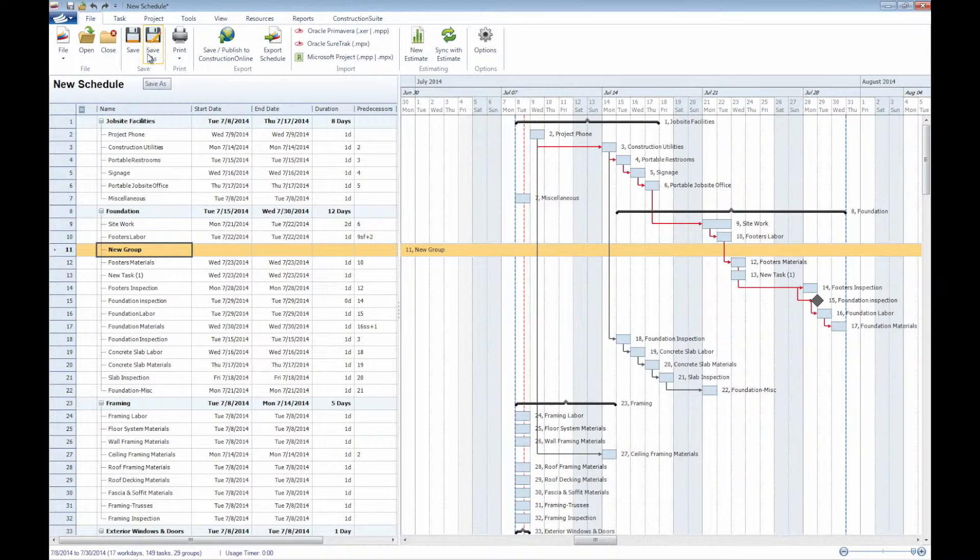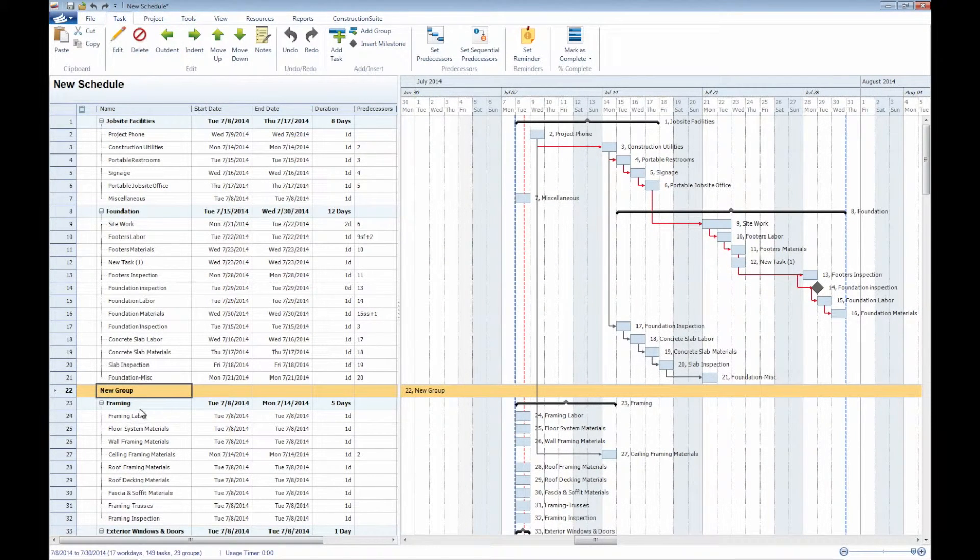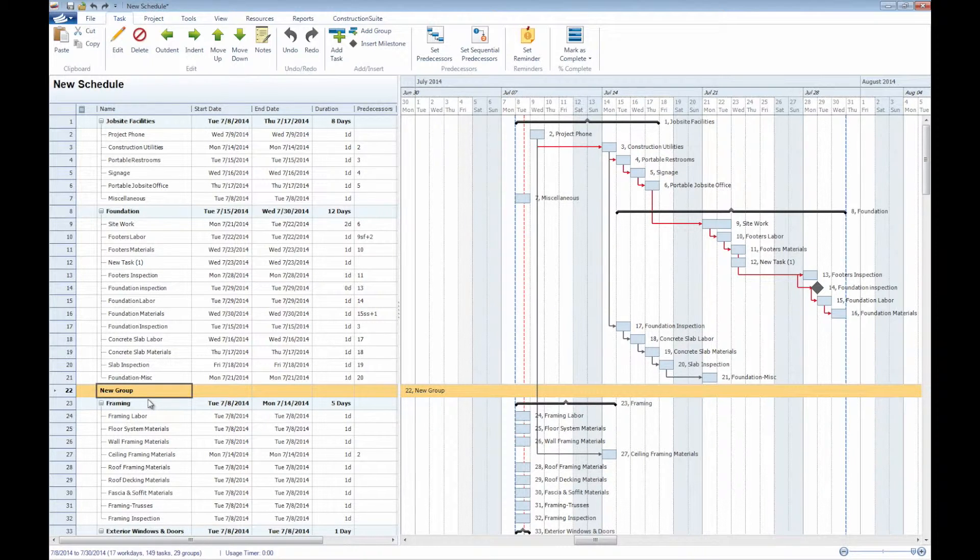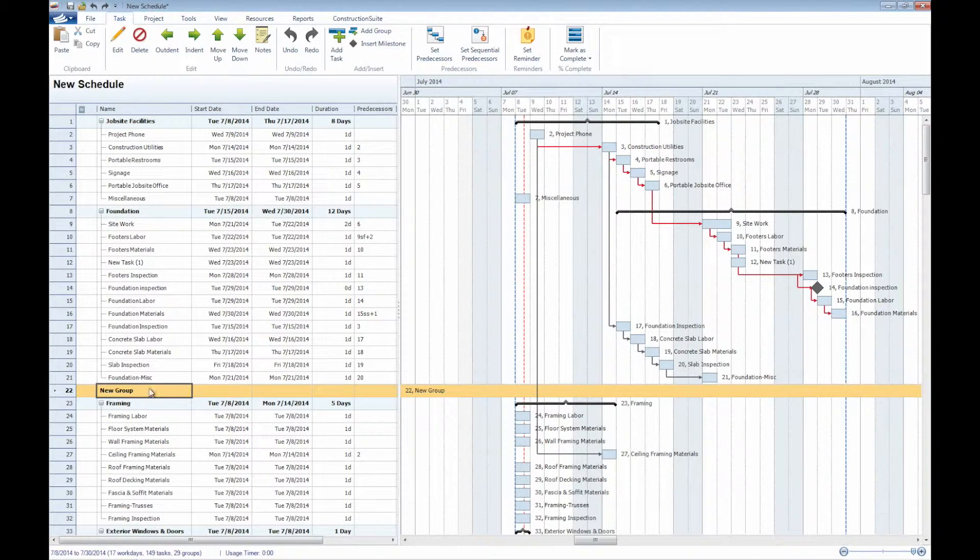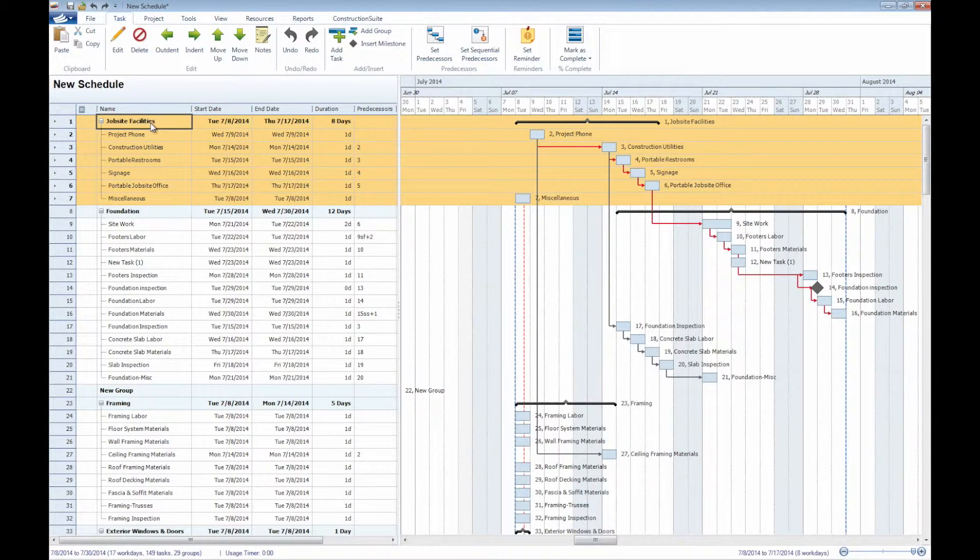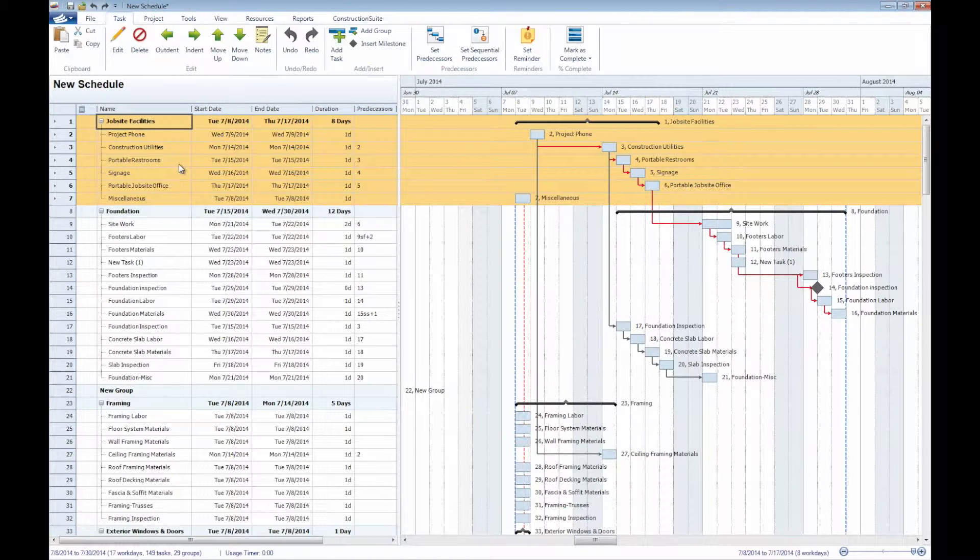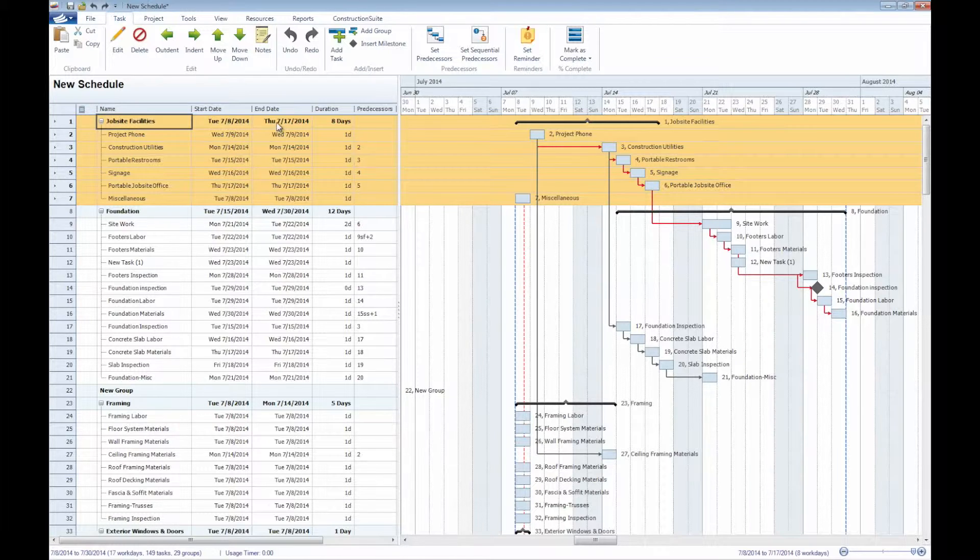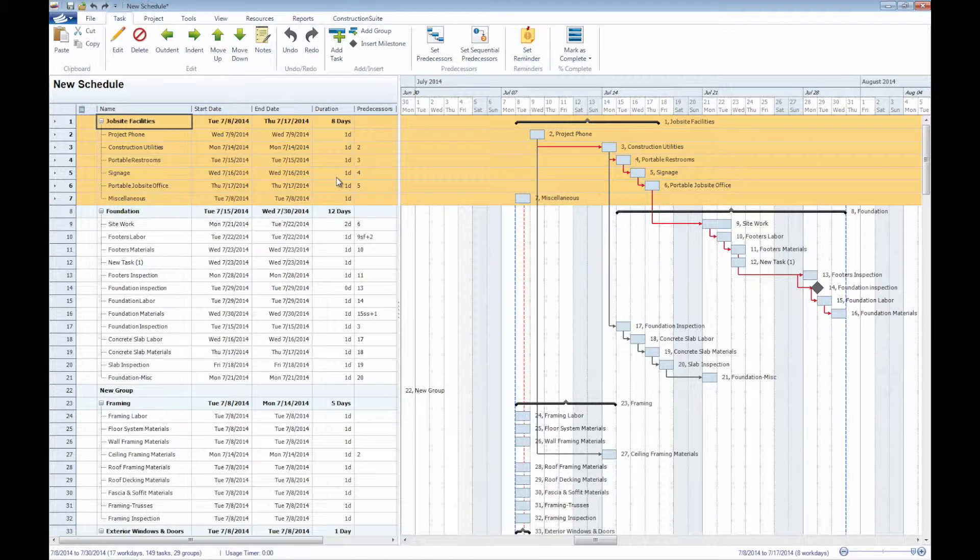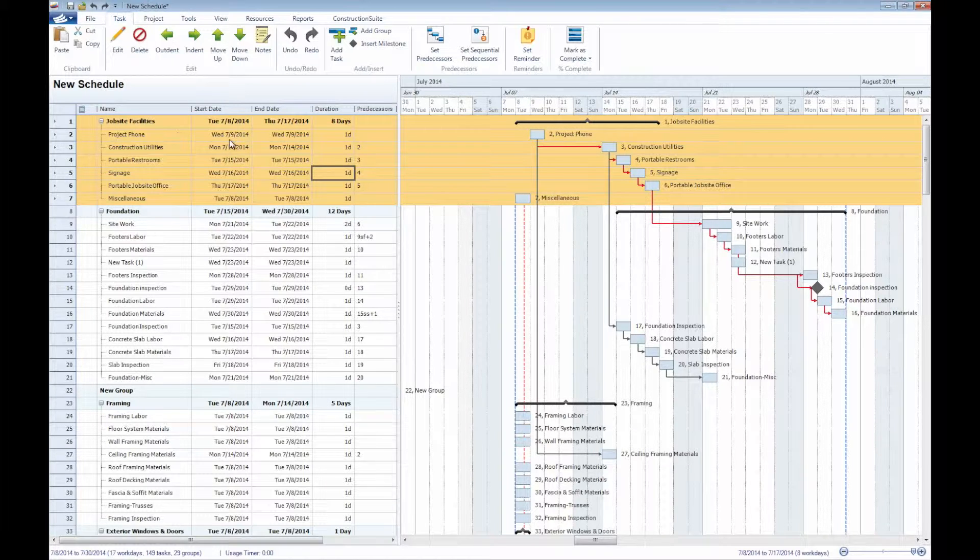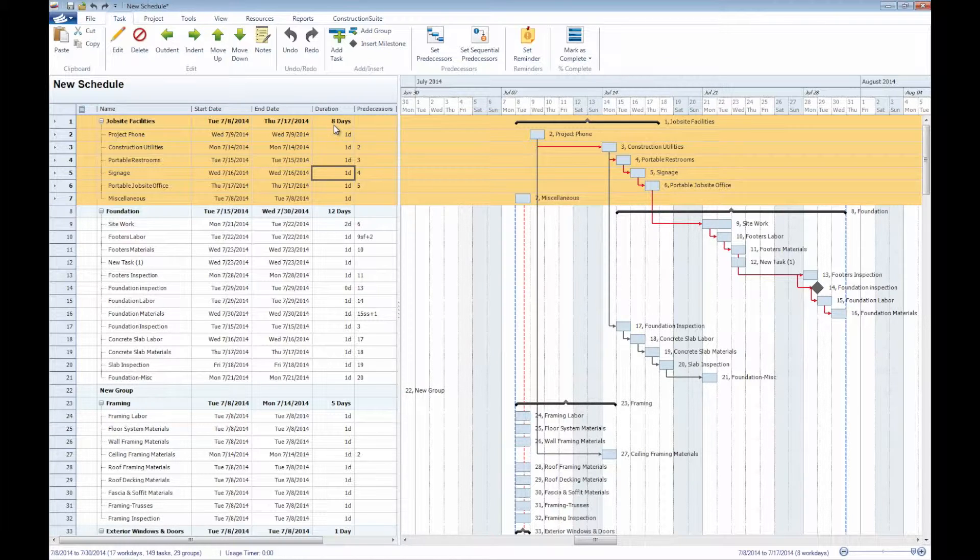Just like within our estimates here, our groups are going to include any of the tasks beneath them, much like the categories, whereas the tasks within the schedule are very similar to the subcategories within our estimates as well. We'll see here that we do have a group, job site facilities, and the corresponding tasks, or subgroups, if you will, beneath these as well. All the information that is included within the group here, specifically with the start date, end date, and duration, are pulling directly from the corresponding information of the tasks beneath it. We'll see here that within the job site facilities specifically, for the eight tasks that we have for one day apiece, all total to a duration for job site facilities of eight days.